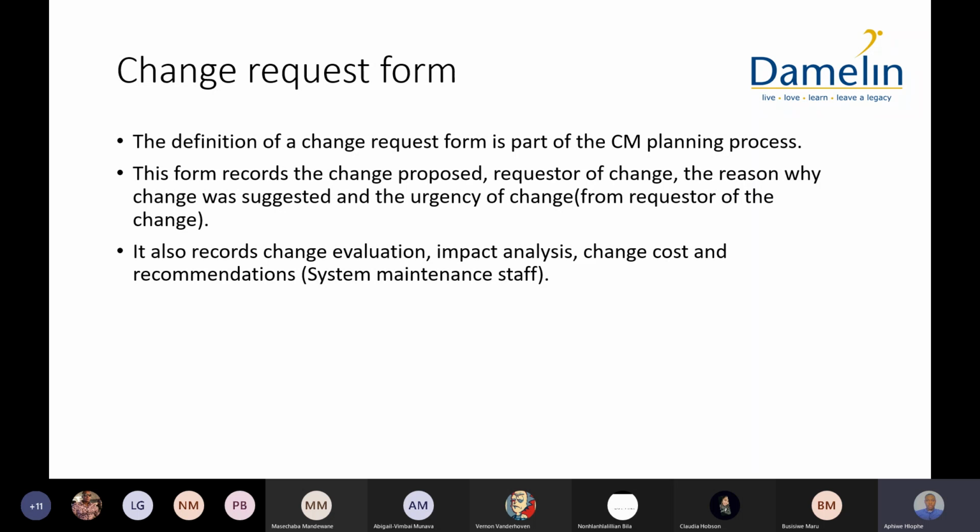Okay, so the change request form is not something that's given to the end users. It's more of something that is done by the project team to initiate change in the project, based on a number of factors. Users' feedback could be one of the factors, and changes to market forces, new technology being released. And then the project team says, look, we need to implement change.